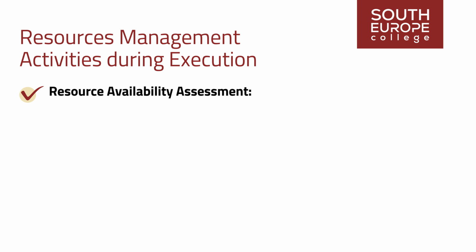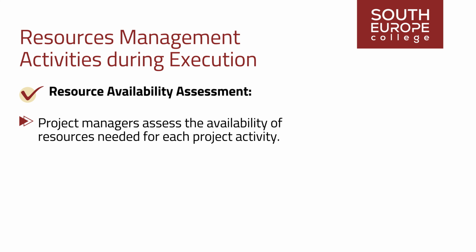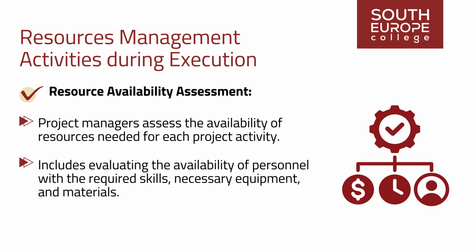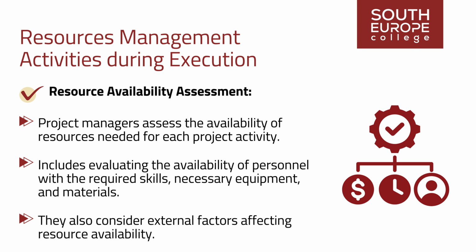Resource availability assessment. Project managers assess the availability of resources needed for each project activity. This includes evaluating the availability of personnel with the required skills, necessary equipment, and materials. They also consider external factors affecting resource availability, such as holidays, vacations, or competing projects.